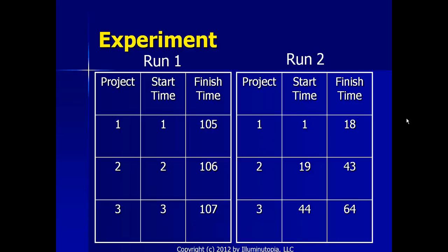So this is important to understand: bad multitasking is a huge waste of time, and it can also lead to quality problems. If you look at what you did on your first run, you may see that sometimes you got a triangle instead of a square, etc., because you got confused about where you last were and made a mistake.